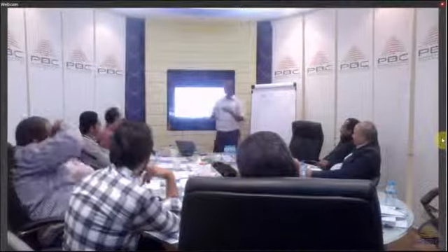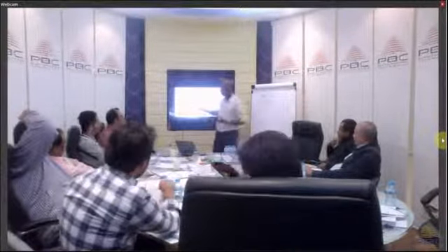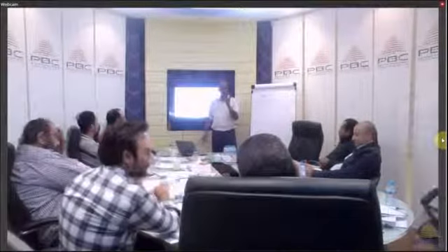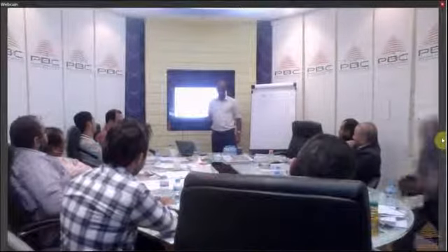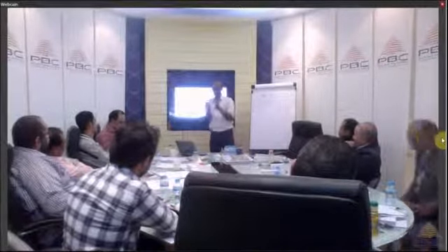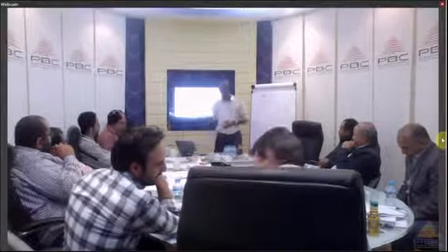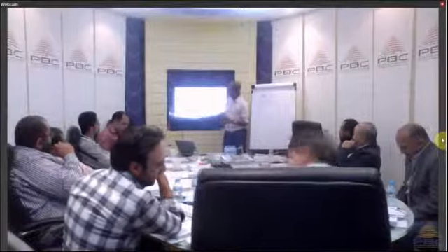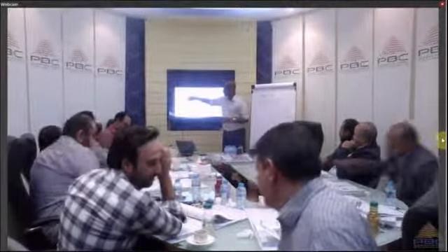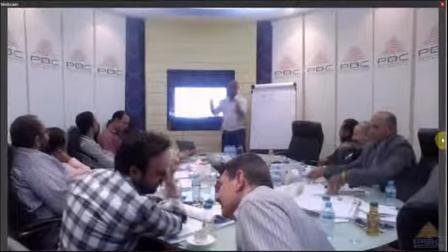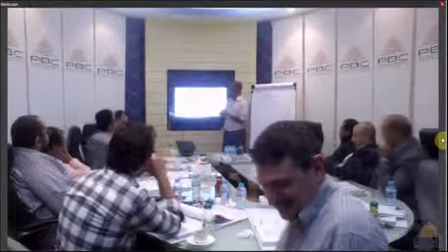Okay, so activities have to start with an action verb, something to be done. So that's why it's very important to name your activities in a very intelligent way, so they make sense. Okay, so when people read it, they understand what they have to do. Okay, so these are general advice on how to create your activity list. Okay, gather inputs and resource material. Decompose each work package in the WBS into activities.